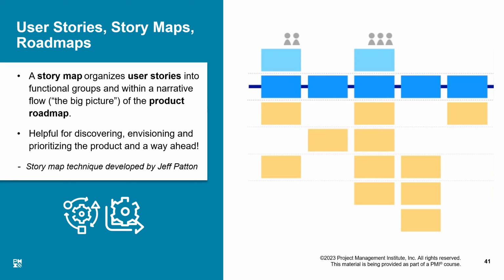So user stories are not connected, but some of the user stories may have certain types of interdependencies, and those interdependencies are shown like this line here. The blue post-it notes are connected through a line going through them. That is the kind of sequence in which these activities are supposed to happen. This first blue sticker must be completed before the second can start, and the second should be completed before the third can start.